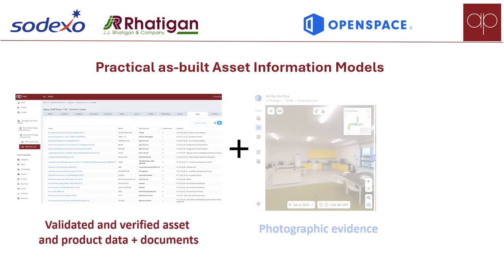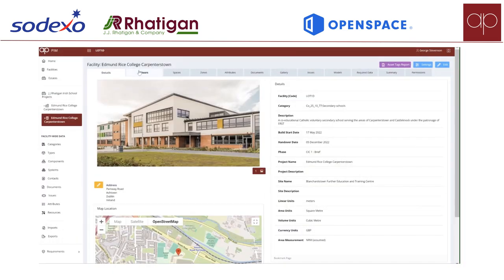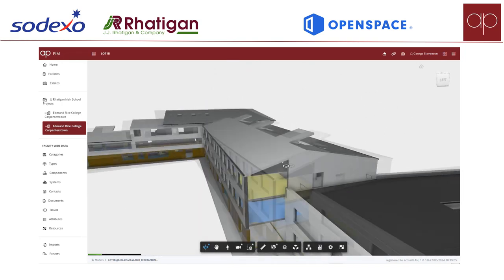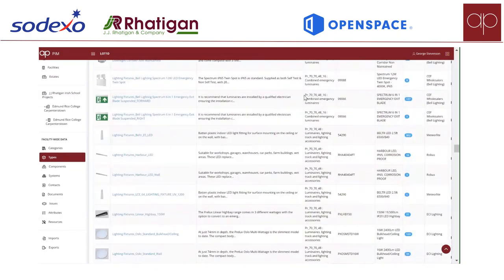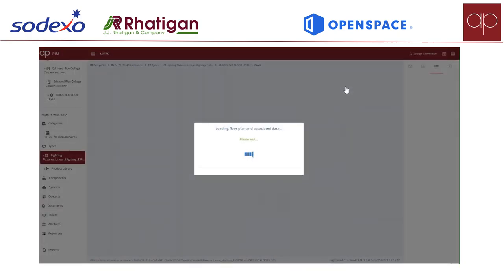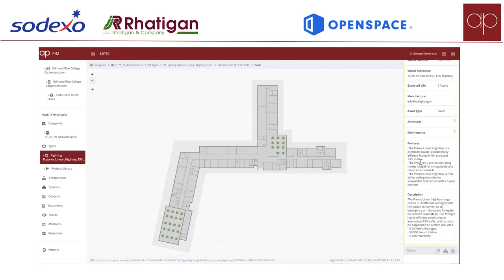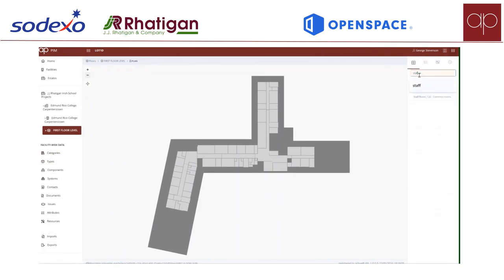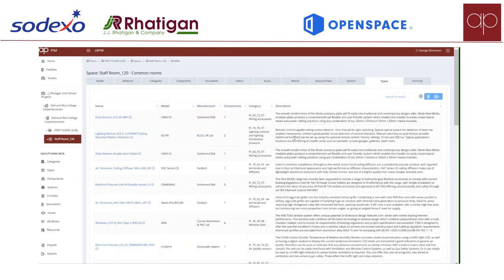Plus, it's much easier for FMs to update with any changes. We found Rattigan Construction in Ireland very tech-savvy. They realised this new joined-up way of working meant that they didn't have to add product data into Revit. The models told them where asset types should be installed, so they persuaded their specialist contractors to use ActivePlan as part of their tech sub-process to record manufacturers' products they bought. By connecting the asset types in the model with the product library, the manufacturer's product data and documents are automatically connected to every single asset, so trade contractors only have to add their installation and commissioning details.